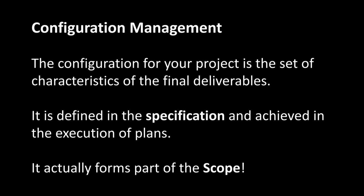So what we're going to do is, as part of our scoping document, we are going to lay out all of the specifications for all of the parts that we're going to produce as part of this project. Now, for a lot of your projects, there won't be huge amounts of specifications. For others, there might be lots. If you're doing engineering projects, the chances are that you've got lots of detailed specifications for each individual little component. Same within electronics. You can't just chuck any resistor in there. It needs to be the right one. So you're going to specify what resistors, what capacitors, what chips, etc.